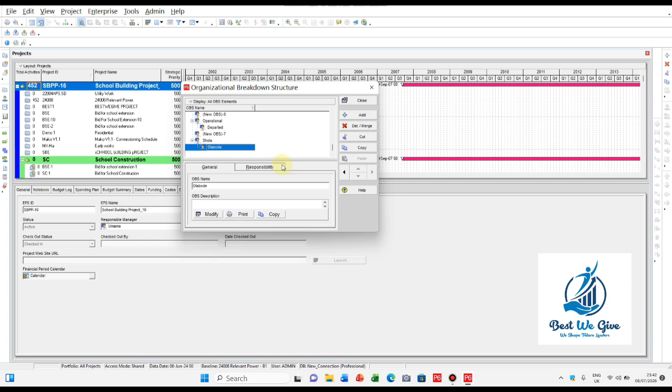You might be wondering why Primavera P6 requires an OBS. Here are some important reasons. It assigns responsibility for projects. It connects managers with the enterprise project structure. It improves project governance. It controls security and user access in a large Primavera P6 database. It makes project management more organized and easier to understand. So with an organizational breakdown structure, assigning responsible managers during project creation becomes much easier.